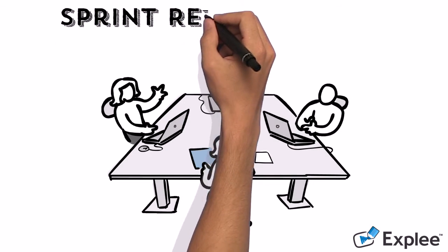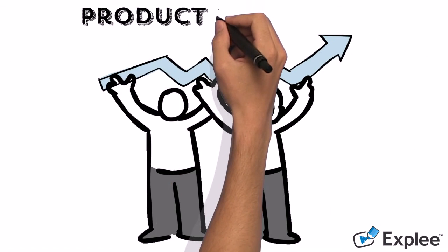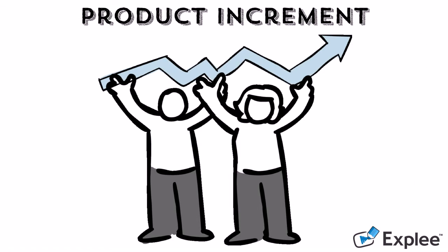The fourth step: when a sprint completes, a meeting is held where the resulting product of the sprint backlog is presented. A sprint retrospective meeting can also be held for up to 3 hours, evaluating the techniques and skills used to assess whether they can be improved and applied for the following sprints. Last, repeating for each sprint backlog, we would obtain the final product as a succession of small increments.